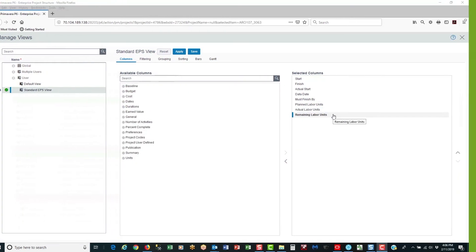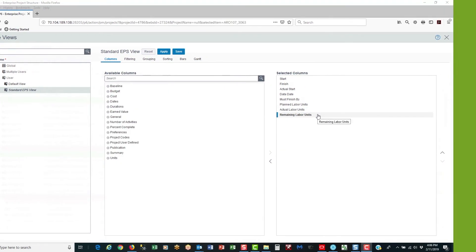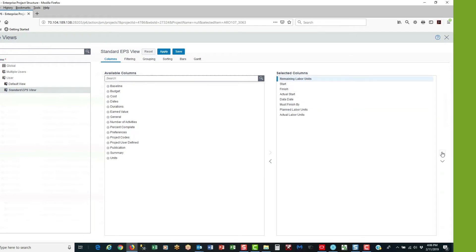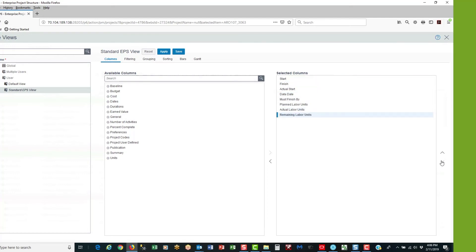It's also important to note that with these up and down arrows I can choose the order in which columns appear on the activities table. If I move a column to the top of the list it's going to appear on the far left, and if I move it to the bottom it's going to appear on the far right.